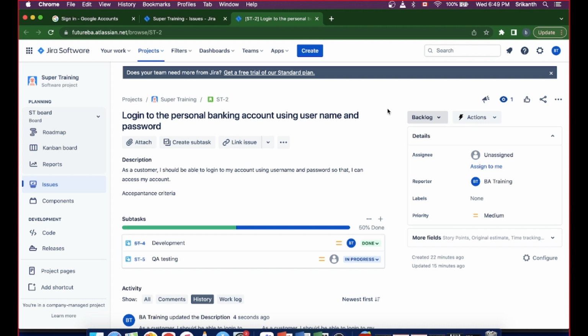Guidewire supplies a set of user stories, and companies customize them according to their needs. Sometimes they omit user stories which are not needed. For example, there is something called audit transaction which most companies don't implement, so the story cards or epics related to it are not needed, and we just remove them from our backlog. Okay, Sam.